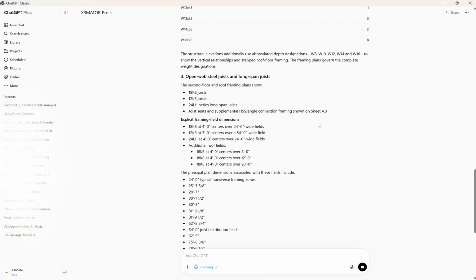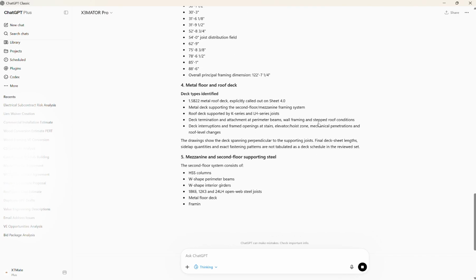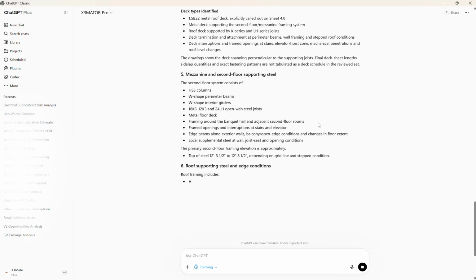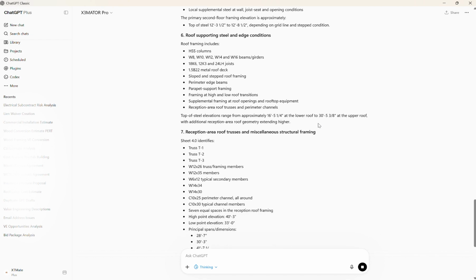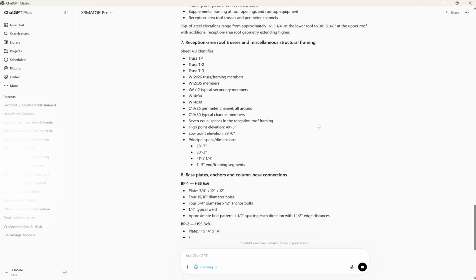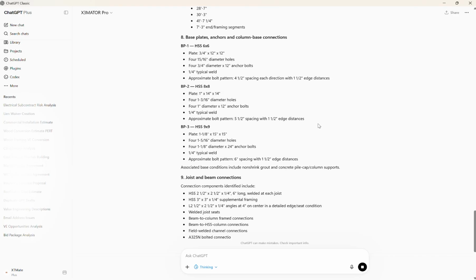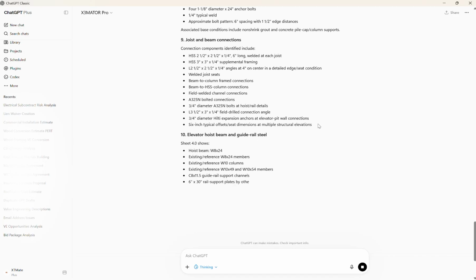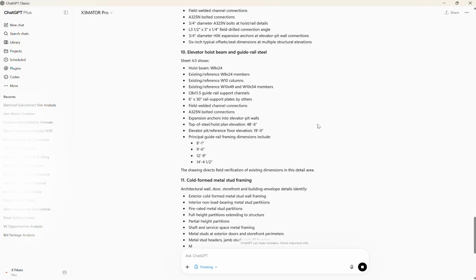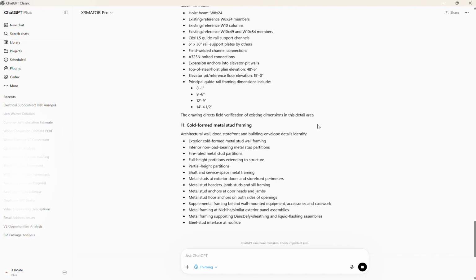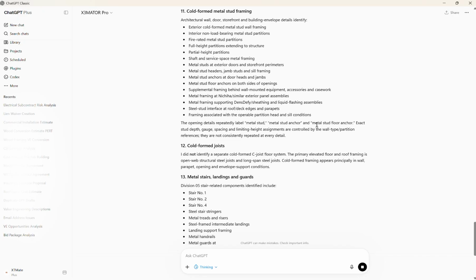His idea was to revisit an original design that had been abandoned earlier because of cost. With the market flipped upside down, that old design might now be the more feasible option. But somebody has to reestimate that structure fast in a market where getting steel pricing is already painful. Here was my plan. The team needs detailed Division 5 costs: structural steel, cold formed metal framing, the mezzanine and deck system, and miscellaneous metals, broken into categories they can actually study.